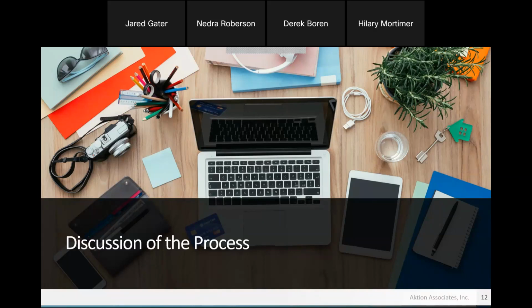Yep, absolutely. And those can be driven off of a number of different things, right? If we want to drive that off of a static field that you're going to set inside the project, or off of a combination inside of there, again, we can look at it from a lot of different ways. The data all sits inside of the system. So if there's a piece that we have to check or run in Flux, it runs through that when it creates those terms. We can pull it off of whoever the project manager is, off of whatever org or profit center you set up on your particular project, or even that phase of the project as it goes through, if we need to have some sort of adjustment for it. So again, a lot of power inside of there.